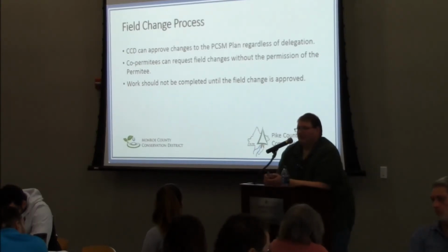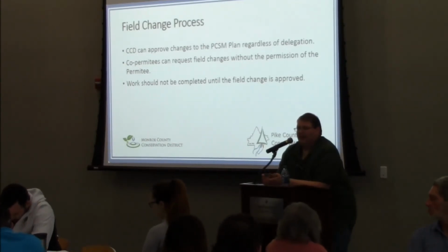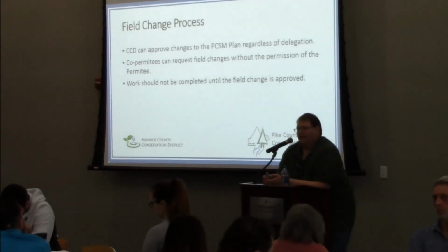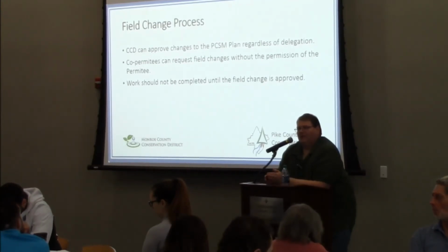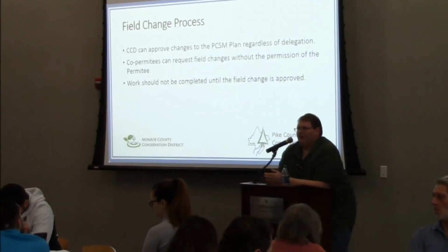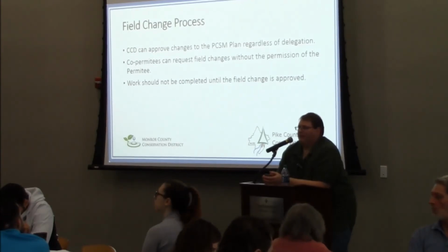And the time to do that is as soon as you know you're going to need a change. Most projects, larger projects, smaller projects, have some sort of coordination meetings, weekly or otherwise. And those are the times where you need to identify where those changes are going to happen and get them to us as soon as you know so that we can react. We're pretty quick, but I know that things happen in the field very quickly at times. So the further notice we have, the better off you are, and the less likelihood that there's going to be anything slowing up in the field.